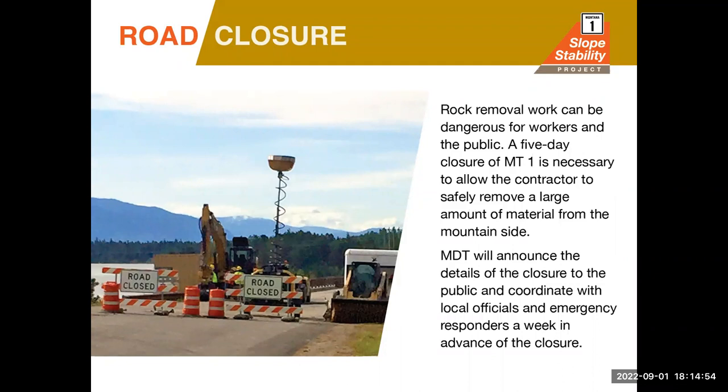During the closure, MDT will work closely with local emergency services, the school district, the U.S. Forest Service, and the county to mitigate any emergencies that come up. Electronic message boards will be placed at the intersection of major regional roads and highways, providing advance warning of the closure at least a week in advance of the work. I'm now going to turn back over to Brandon Coates from RBCI, and he can give you a little more specifics about our advance warning.